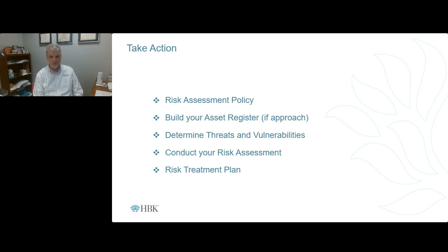And then you want to actually conduct your risk assessment. That's more or less the scale that we talked about, where you've got either the 3 factors on the XY axis, or 5, or however many you want, and measure yourself: all right, here's my asset, here's the threat and the vulnerability, and this is the impact if something bad would happen. This is the likeliness of something bad happening, and you do the math, then you rank everything and see what your most risky things are, and then you're going to want to put controls in place to mitigate those risks as much as possible.